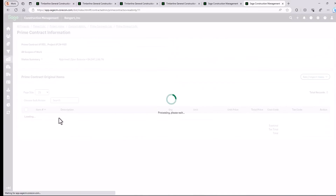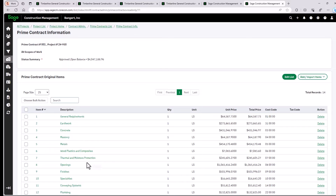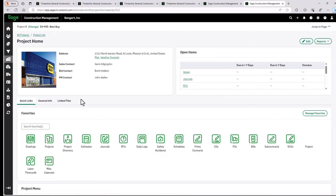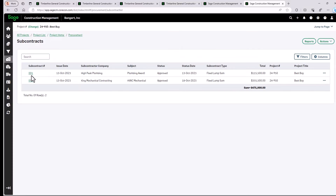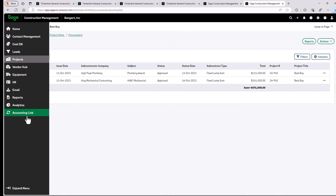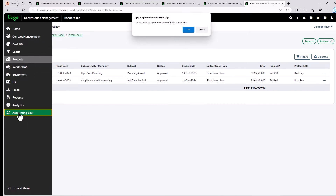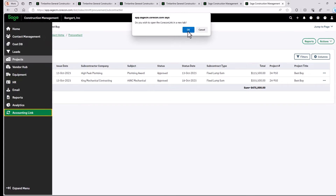You can see the schedule values right here. This list was derived from the estimate automatically, or you could import it if you chose to. I'm going to come over to subcontracts, and you can see that we have two subcontracts set up on this project. So let's go ahead and send the information over to accounting for tracking purposes.